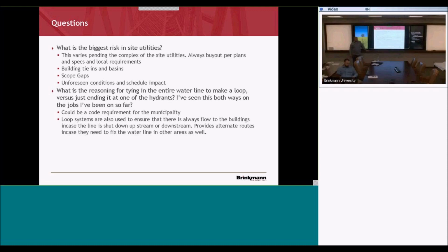3-inch C90 PVC pipe, install about 300 feet, $45.33 unit cost. We have 8-inch PVC sanitary sewer for like 1,500 feet, for $35. Yeah, Krista's got a whole page of unit costs that she can send to you from the crossings on the road. Unless you're getting robbed on that 24-inch. Ours is $49.